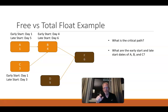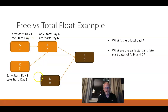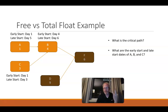If the late start date for B is six, and A takes only one day, then the late start date for A is day five — one day for A, then days six through nine for B's four days, then days ten through fifteen for F's six days. Now for task C: if the late start date for B is six, and C takes three days, counting back — five, four, three — the late start date of C is day three.